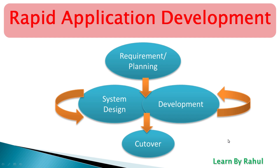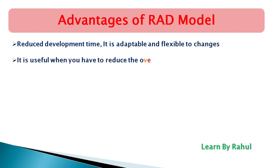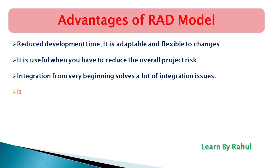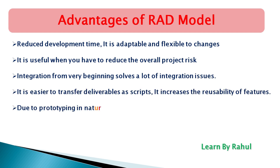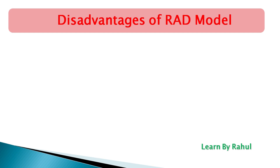More focus is paid on the adaptability of the development workflow. The advantages of RAD model are: it reduces development time; it is adaptable and flexible to changes; it is useful when you have to reduce overall project risk; integration from the very beginning solves a lot of integration issues; it is easier to transfer deliverables; it increases the reusability of features; due to its prototyping nature there is a possibility of fewer defects; and each phase delivers the highest priority functionality to the customer.